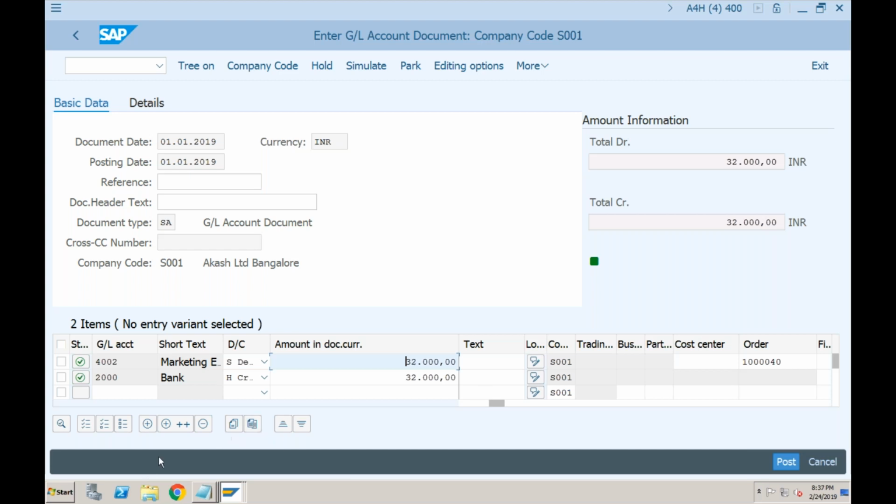I think it should have thrown the warning message, or maybe let's try to do one thing, because we changed the 80% now. So let's make it 36,000. At least the 90% warning should come, right? Sorry, now we are consuming more than 90%. So what is the amount? 10,000 we already booked, and we are trying 36,000 additional. So total will become 46,000, and 95% is 45,000. So it is exceeding by 90%.